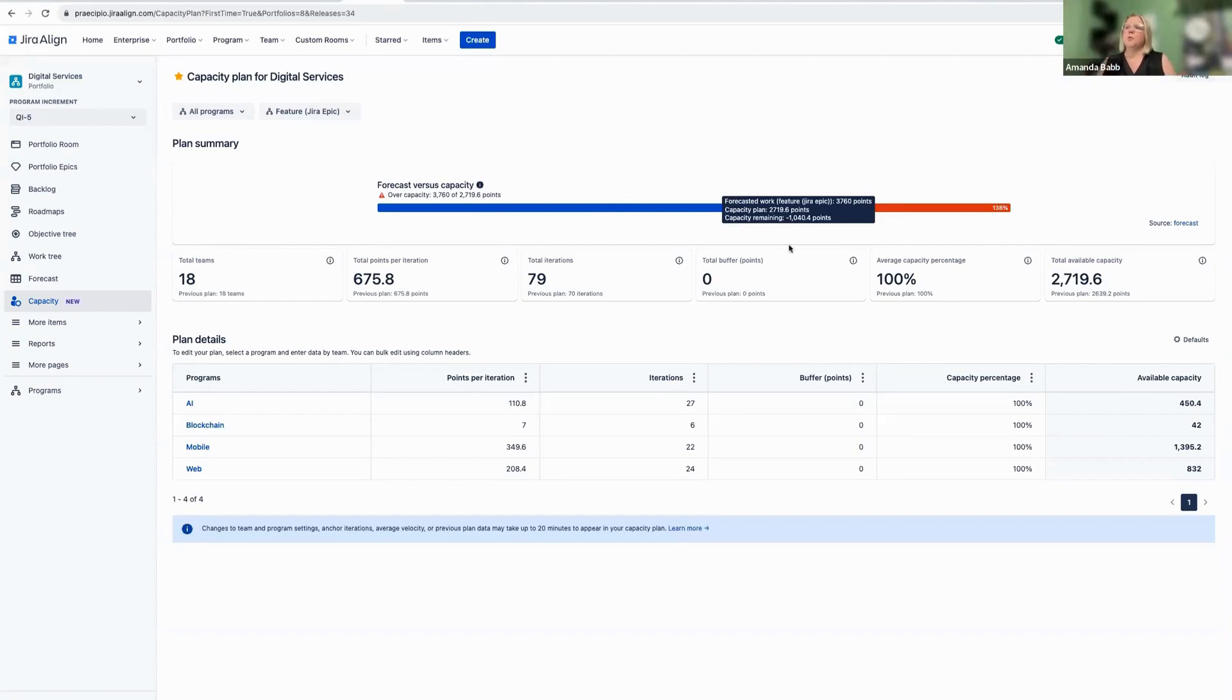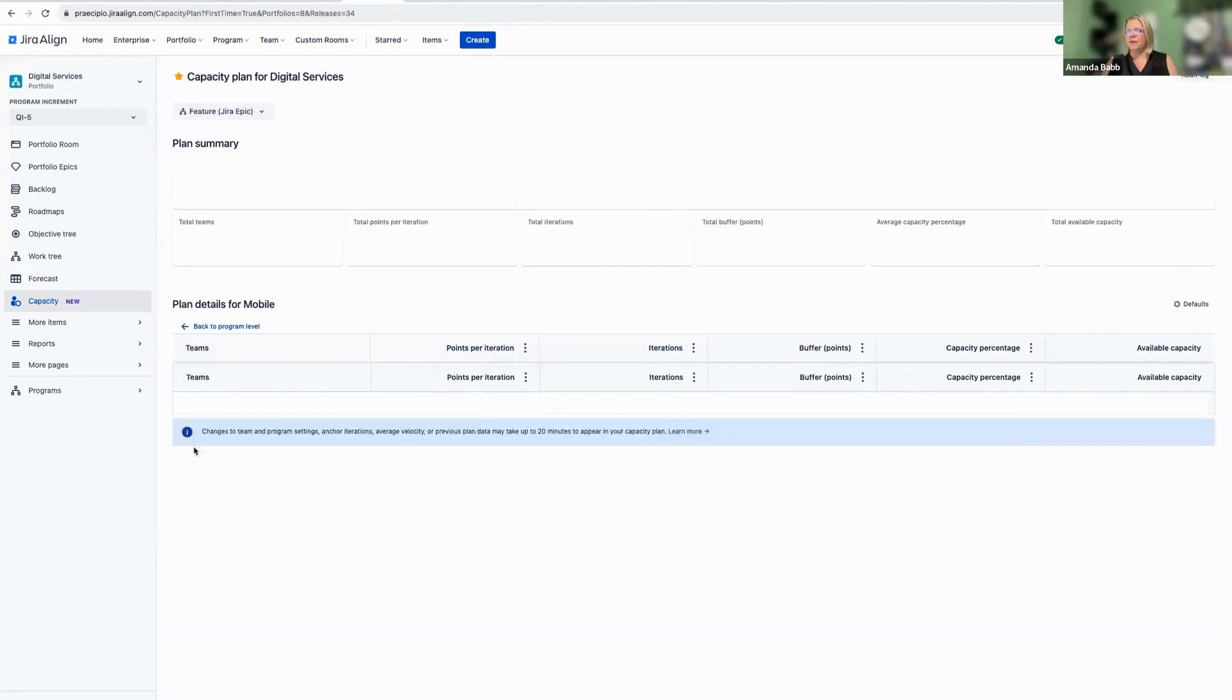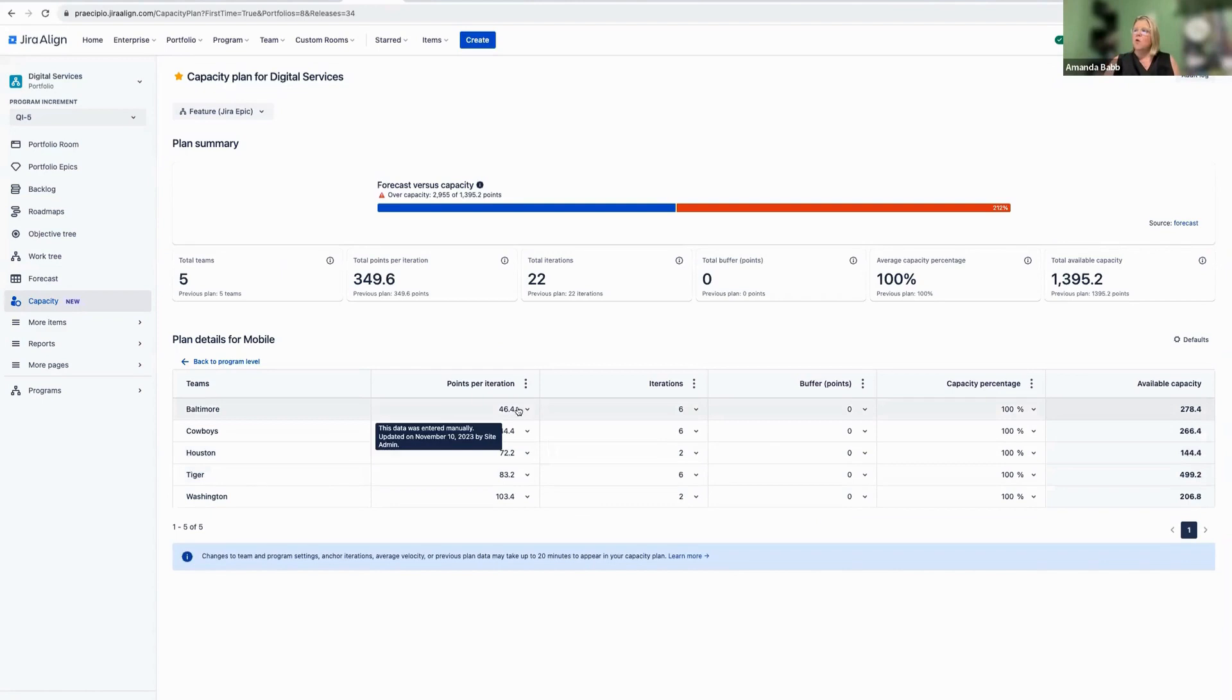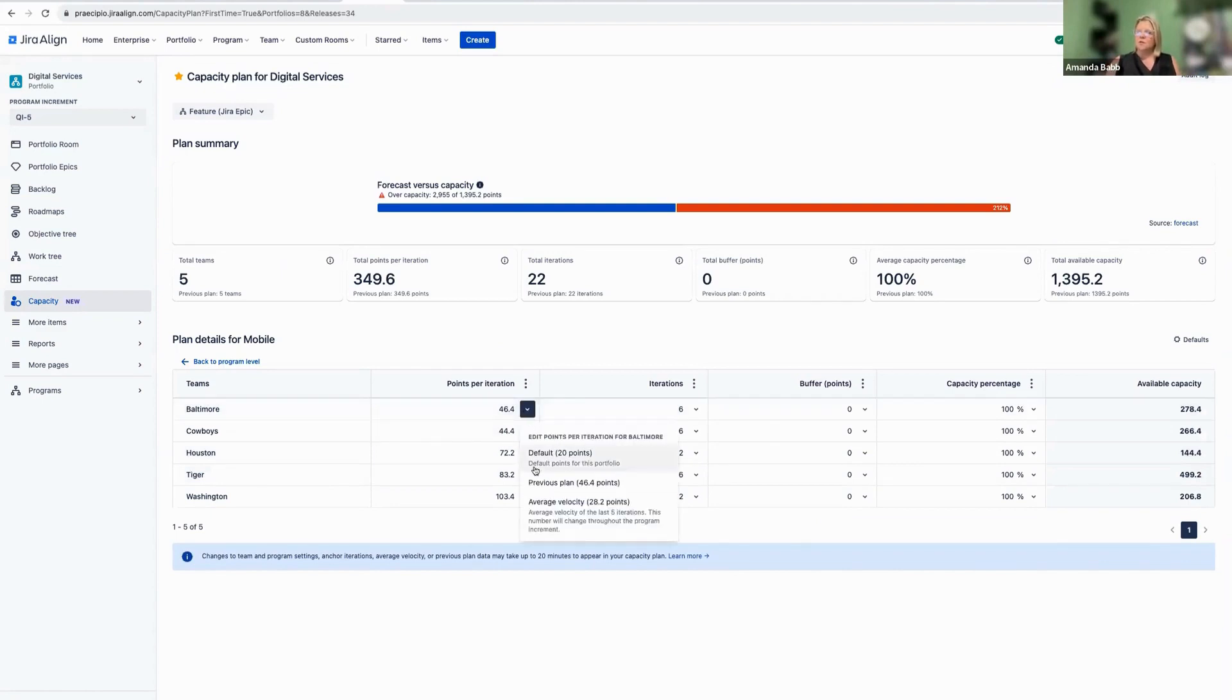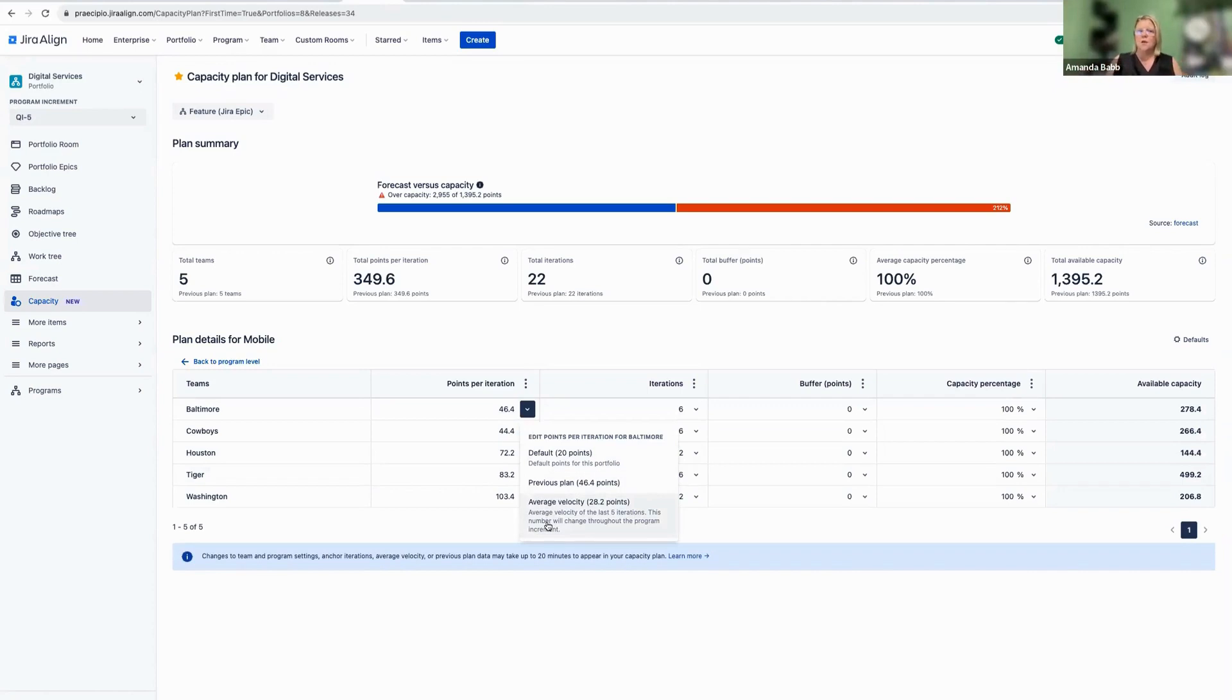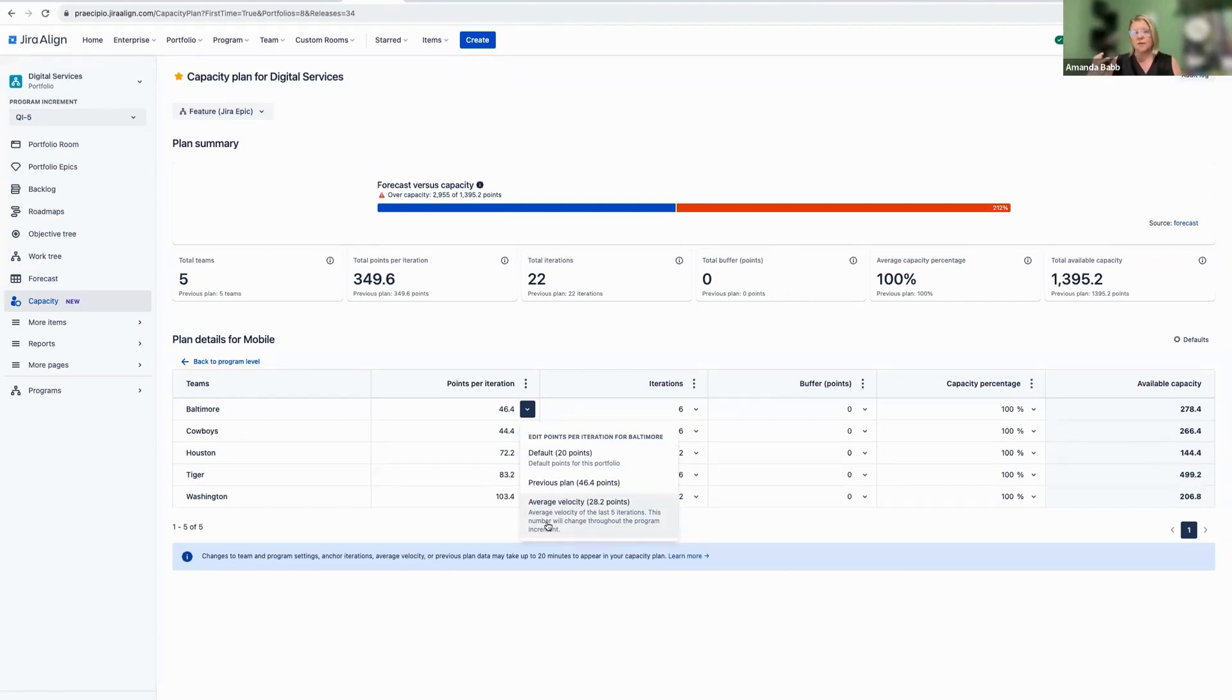Great, wonderful, super exciting. But what does this all mean, Amanda? Let's dig into this a little bit. So again, for each of the teams that's in your program, we can set their points at either a default, the previous plan, or an average velocity per team. So that means that we can look at our historical performance for each of these teams and bring that data over into Jira Align. We can also manually set this, if we'd like to, to account for future capacity or availability.